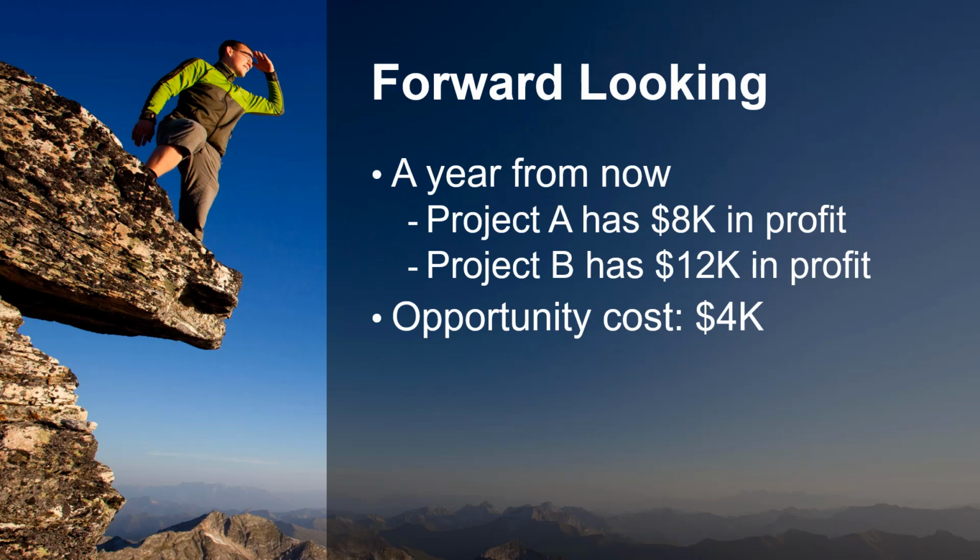In hindsight, you realize you would have been better off with Project B. In this case, you would only talk about the difference here because we're after the fact and you're no longer trying to decide which project to choose. But before, forward-looking, the opportunity cost is always the cost of the opportunity you did not choose.